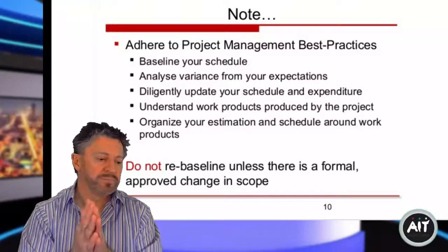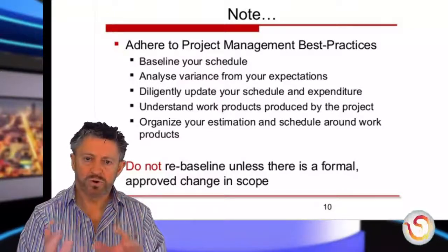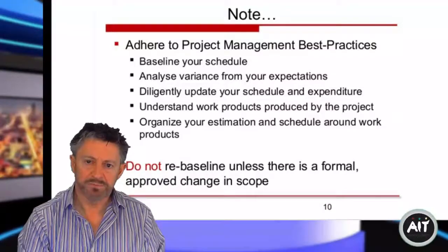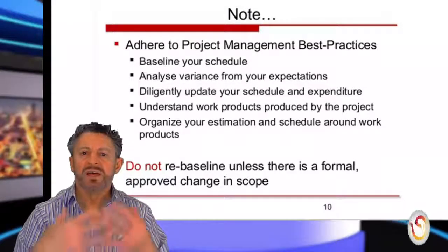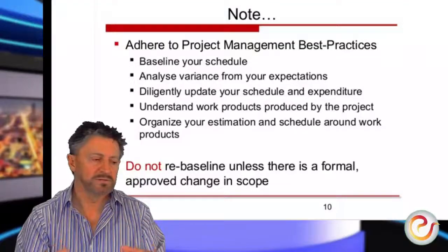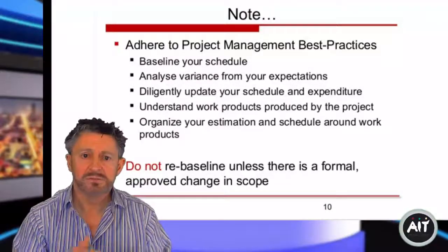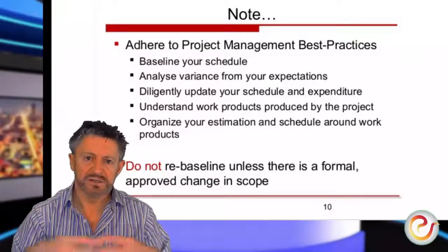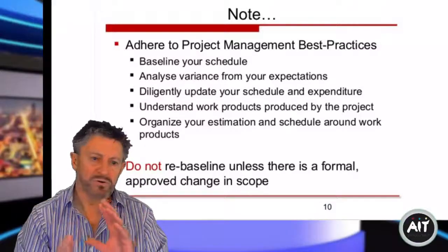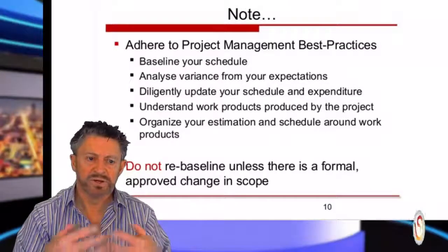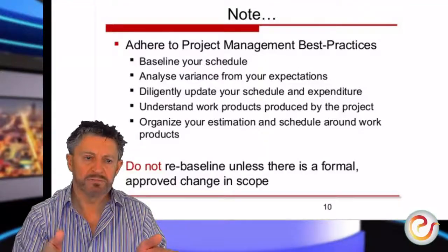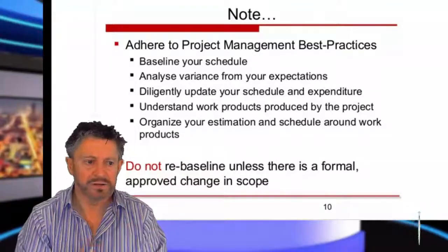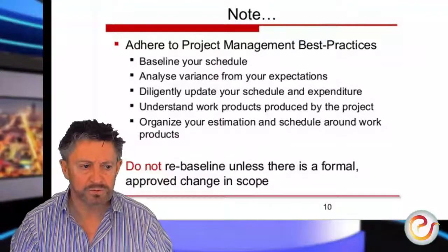So if you're building a house, you can see that the first work product is getting the foundations in. There's a lot of work to be done, but you get the basic foundation in. That's a work product. The next product, or part of the deliverable, might be the walls in your house, and then the roof, and then you have all these other activities going on simultaneously. Now we have the roof on, we have all the plastering, we have all the electrical and plumbing all done, and so on. These are all products, so we can say, is the plumbing complete? Yes. Here's water running. Is the heating system working? Yes. These are all deliverables in parallel, but at least we can schedule the work.